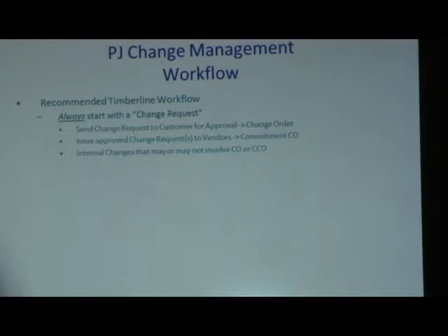The system doesn't force you to, but I encourage you to always start in the change request screen. That way your change request log becomes the master log of every issue on the job. So every issue that was approved by the owner, every issue that turned into a sub change, every issue that's an internal adjustment, whatever it is, it'll all be in that master change order log.